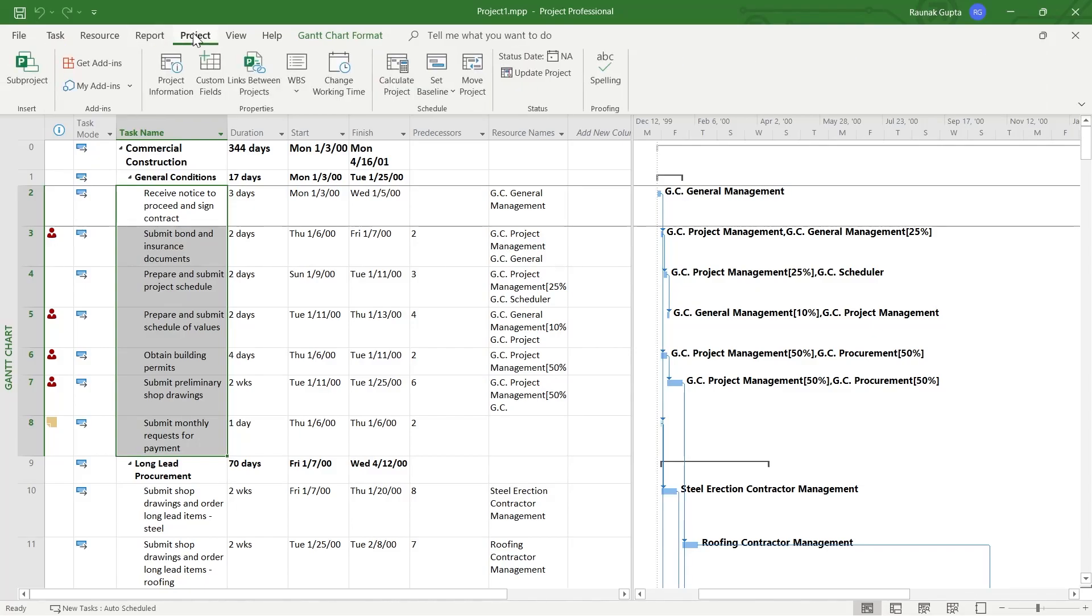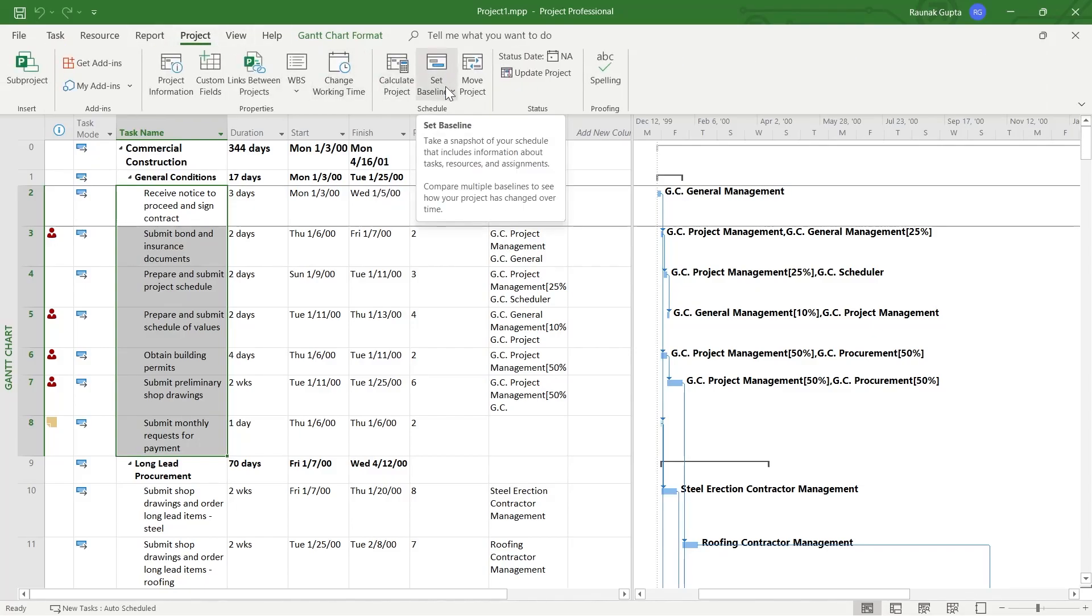and then here you'll see an option that says set baseline. So you can take a snapshot of your schedule that includes information about tasks, resources and assignments and you can also compare multiple baselines to see how your project has changed over time.